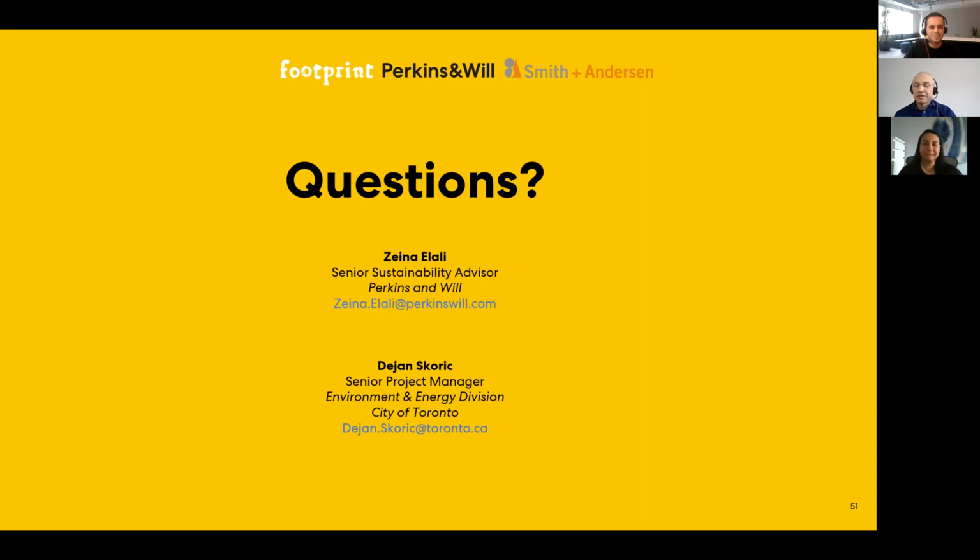Yeah, and I would agree with that. For the projects that we studied later that required net zero emissions buildings from the RFP stage right away for the architects and design team, we saw that it's just a smoother way of working. With North East Scarborough, the design team had to go back and we tried to figure out which of the measures they installed or investigated could actually be based on the type of design. When you start right away, in the first steps of schematic design, the flexibility is just much bigger, and that allows us to explore deeper than we were able to do here. We were much more limited with this first one. But that's the lesson learned.